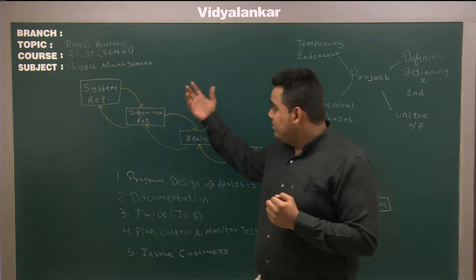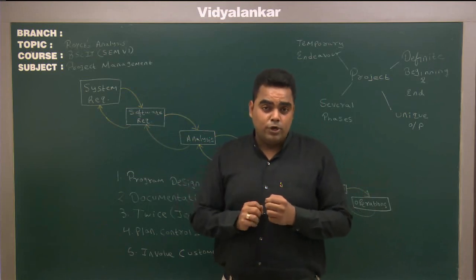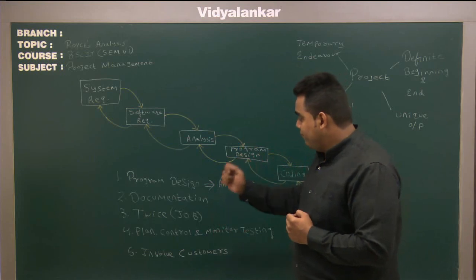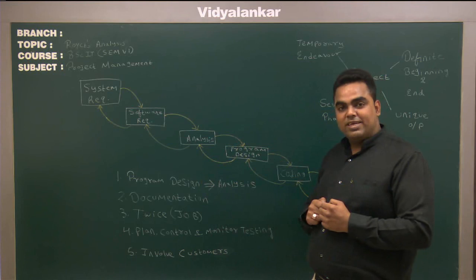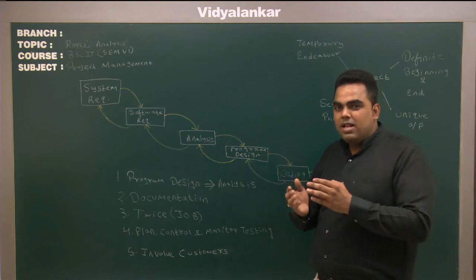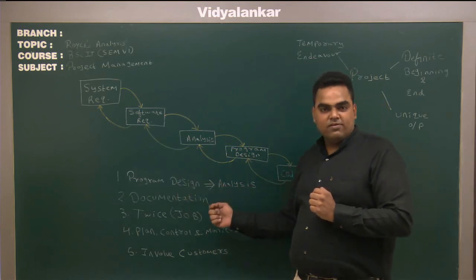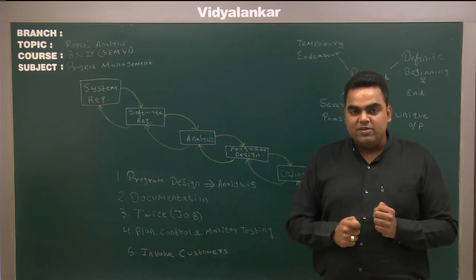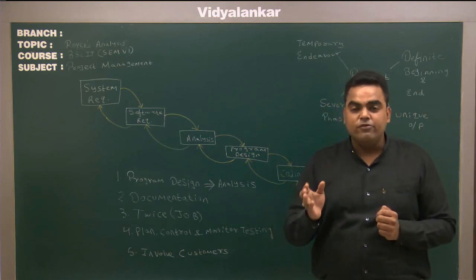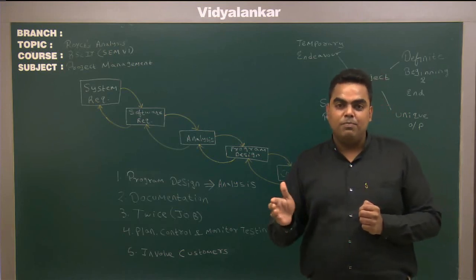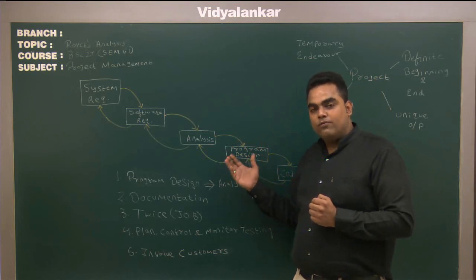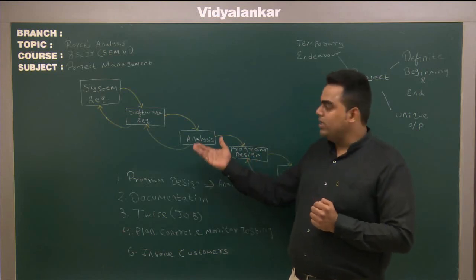This was some detail about the waterfall model. In this waterfall model, I would like to add five important steps everyone needs to care about. The first step is reversing the order of analysis and program design. In the waterfall model, analysis is listed before program design — but I will reverse the order. I will first do program design, then analysis. Why? Because in analysis, you need to specify the time and cost required by the project, but to calculate the time and cost, you need to know how many modules are in your project, how they are going to be implemented, and in what flow — which comes under program design. So, first do program design, then do the analysis.